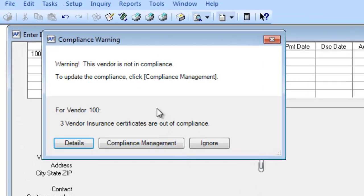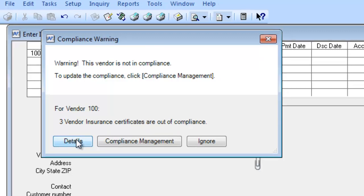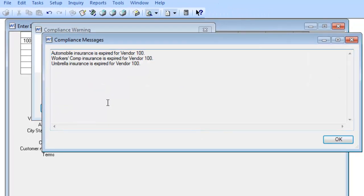As you can see, it's warning me that I have three insurance certificates that are out of compliance for this vendor. If I want a little bit more information, I can hit the Details button. This will tell me exactly which insurance certificates are out of expiration. So it's Automobile, Work Comp, and Umbrella.